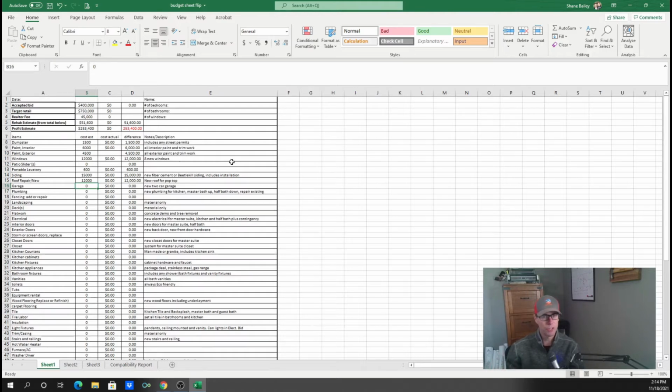We can't do any electrical, plumbing, or anything like that, but we can run all the utilities to the garage, and then someone can come in and finish it. That keeps my costs down, but has the ability to sell to somebody else with a set of plans for them to finish, just like they would come in and finish a basement. So I'm going with garage with structure above, which would mean a 2-story structure, but it's not being finished. No rock or anything has to be done inside that structure. So we're looking at about $10,000 there.